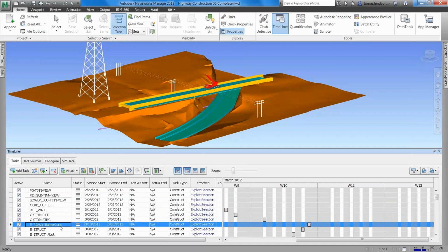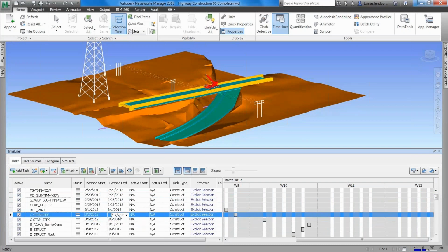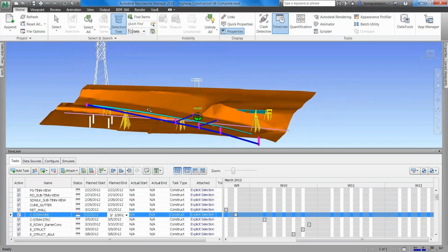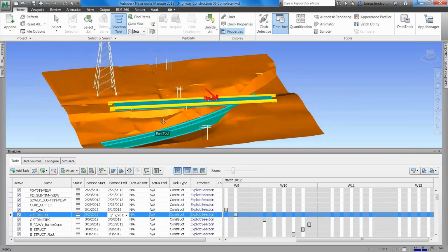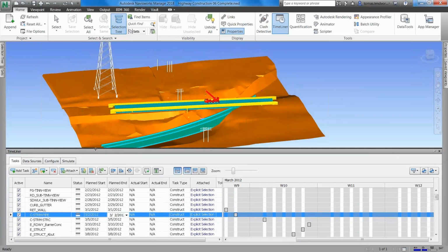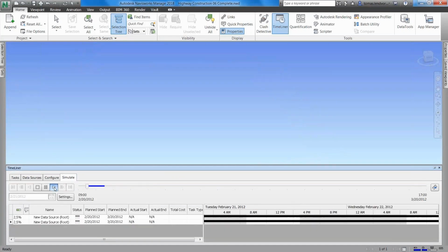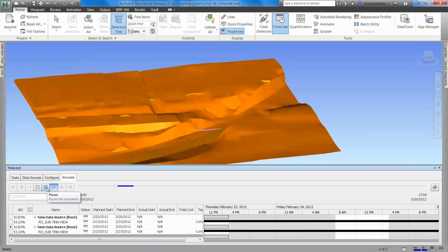So we are assigning time to each object, and you saw that I can assign this timing here, or I can import it from, for example, Microsoft Project, a simple CSV file, or Primavera, because maybe it has already been done, and I will just import it, and it will start to work with this.